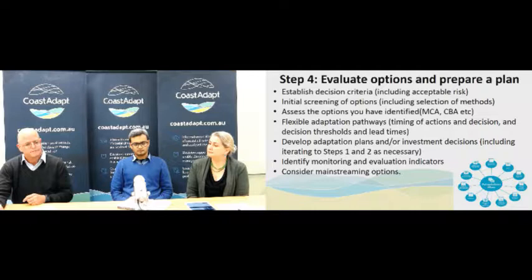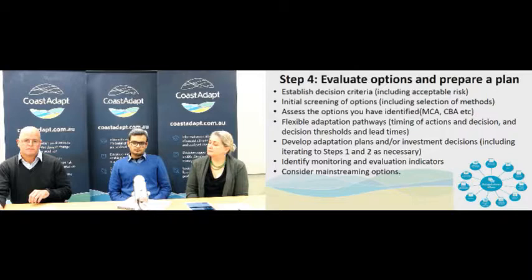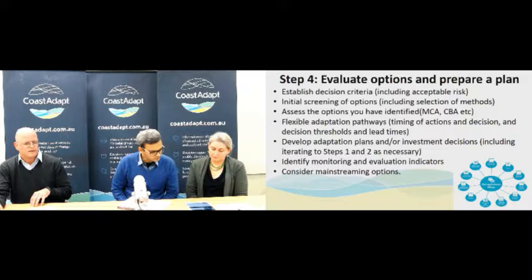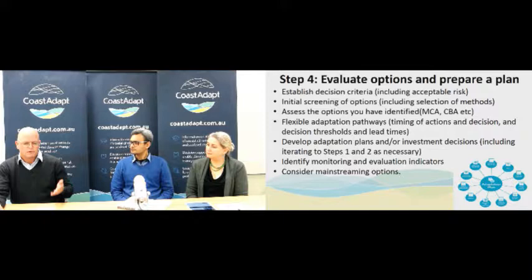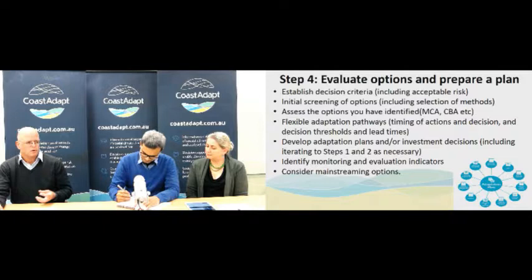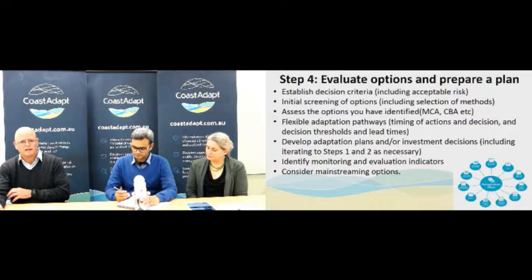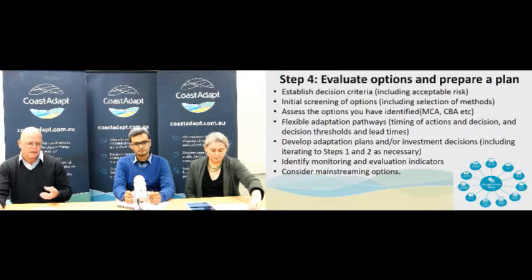Importantly, at this stage of your planning too, as you start to develop a plan, you need to think about your indicators. Indicators that might be thresholds when you should act, but indicators that you might use to look at the success or not of your adaptation options. And those will be very important when you go to the monitoring evaluation phase, but should be incorporated in an adaptation plan. And you should also be thinking about how you can get your adaptation plan to be mainstreamed, or to really become a driver within your organization. And rather than sitting as a plan outside of everything else in your organization, that it integrates everything that's going on, because that way you can really drive things forward.